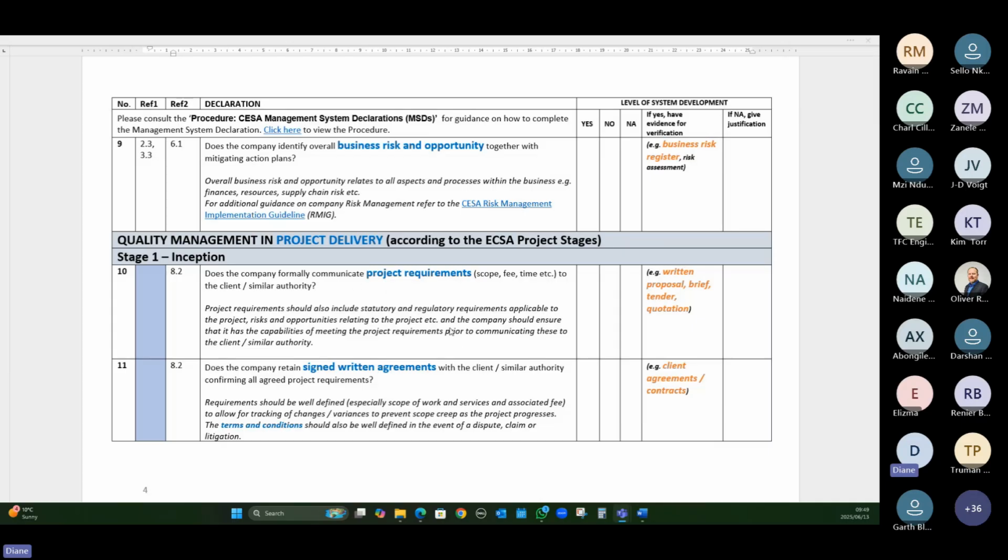And also remember, when a client comes to you, they don't necessarily know everything they need to have on the project. So you as a professional also need to identify the requirements that they don't know about, and you need to advise them of those. I always say, rather spend too much time up front looking at requirements than trying to backpedal at the end of the day when we have scope creep or changes or disputes regarding fees. If you've got a good set of requirements set up at the start, you're going to cover yourself so much more.